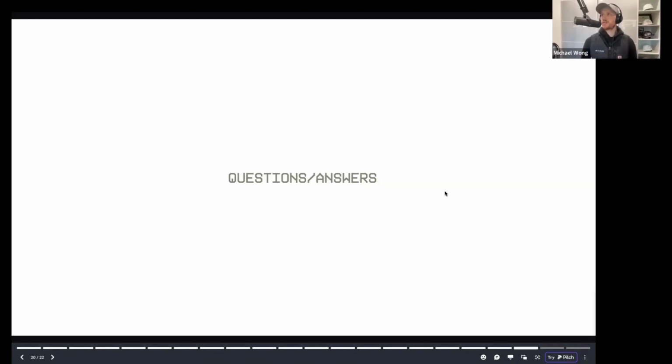I can answer Jed's too. So Jed, good question. Observations are separate from RFIs or submittals, but we already have that integration. We already have an API manager that is looking at that information anyways. So it would be almost similar. The RFI feature is already built to provide that connection, where an RFI written in Procore shows up as a roadblock in the look ahead in Outbuild. It could be the same thing where an observation is made in Procore using the app or the web version, and that also shows up as a roadblock in Outbuild. And it can already be marked as one connected the same way. So that's actually a great question too.